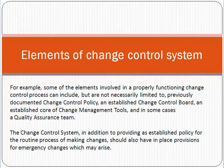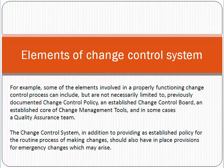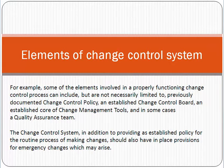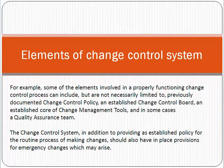The change control process can include the change control policy, the Change Control Board (CCB). The CCB is basically a combination of senior management, IT administration, network administration, and quality assurance persons. The change control system also includes change management tools such as Jira or Bitbucket, as well as the quality assurance team separately.